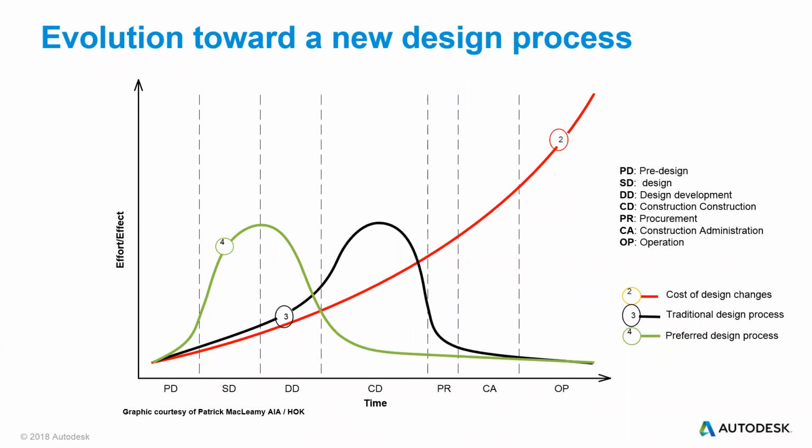Any design changes that are made either in the design office or on the construction site, the cost of those changes increases, and this is purely down to, if it happens on a drawing versus if the guys are already on site, it's going to cost additional money to put additional labor into a design change, or even the loss of materials or rework as well.